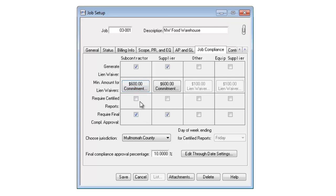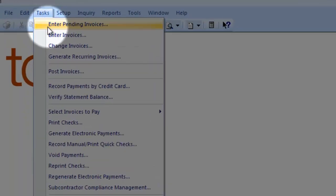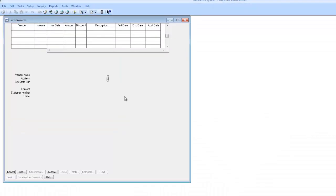This job isn't certified, so I don't require certified reports. But I do require final compliance approval, meaning I won't issue them their final retention check until I've received everything I need from them. This particular job is in Moulton, Noma County, so they're going to need the drug test results. I'm going to enter in an invoice for A1 Electric.